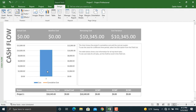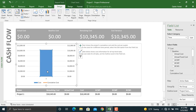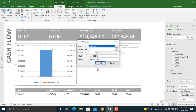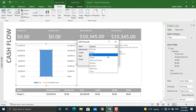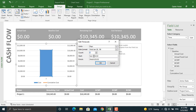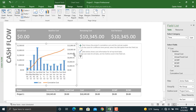You can further break down the cash flow diagram. The default unit is Quarters, which is why we see only one single bar. We will change this to Days. In the Count field, you can decrease or increase the frequency — for example, to see cash flow every 3 days we will set it to 3, then click OK. The cash flow diagram is now generated with finer detail.